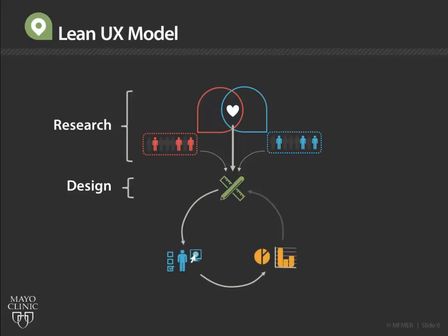Once a thorough understanding of the project has been obtained and a testable solution has been created, it's time to move into the first iteration of the testing and analysis phase. This is where activities like usability testing take place to generate insight that can be used for the next round of design. Like I mentioned before, this cycle gets repeated as many times as there's time and budget for. Twice is really the absolute minimum, but I'd recommend 3 or 4 ideally.